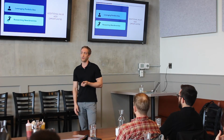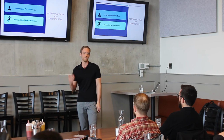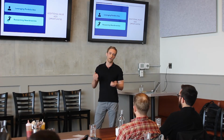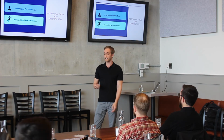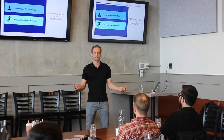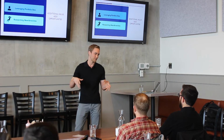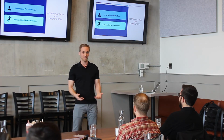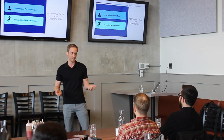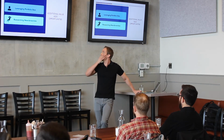One more example of leveraging portfolio size would be we just bulk ordered 140 HVAC units. We work with the supplier all the time, and we were able to negotiate a $300 discount per unit, so over 40K off right there. And not only that, that's not even the end of it. They allowed us to store our inventory in their warehouse and that's huge. We're installing 10 units on average a month, so it's going to be there for 14 months. And to put it in perspective, if you go to a C-class asset, it's not uncommon to see the AC condenser actually chained up outside because people will steal them while they're waiting to be installed. So I can only imagine what would happen if we put 140 of them on site and installed them over 14 months. So that was huge.